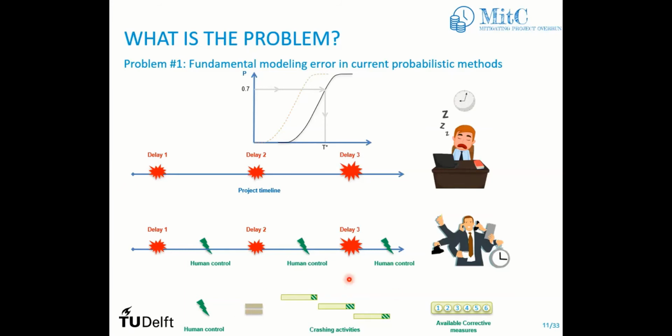So then you have 3 sets in your project available, and that means maybe that your duration from 100 days or 100 units, whatever is in your time, can be reduced to 70%, for example. So, very physical thing, you add certain capacity, in this case asphalt sets, where you reduce basically in a controlled manner the activity of paving a road.